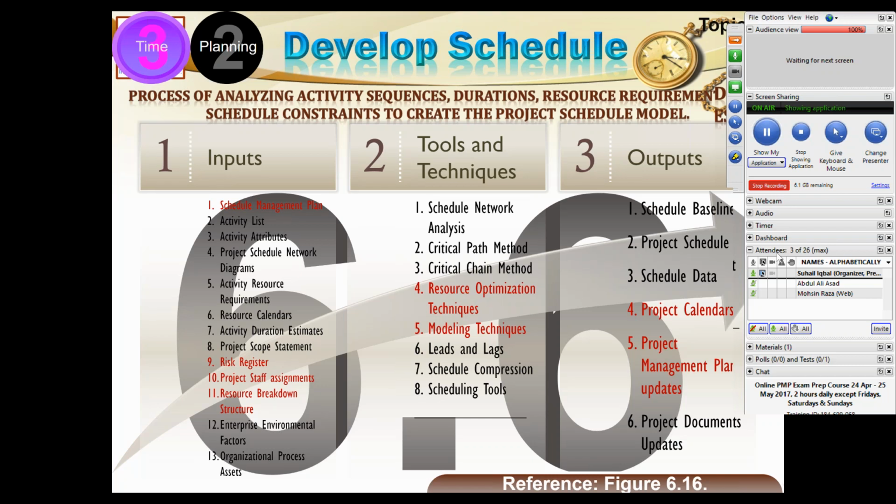And now the people doing those activities would know that they don't have 10 days but 9 days available to them for doing that activity. So they will adjust to that. Like in Parkinson's law, work expands to fill the time available. So when I took out time from an activity, the work will contract to fill the time available.